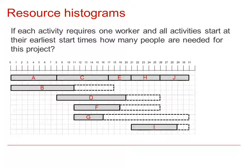Here's our Gantt diagram. If each activity requires one worker and all activities start at their earliest start times, as the diagram shows, how many people are needed for this project?